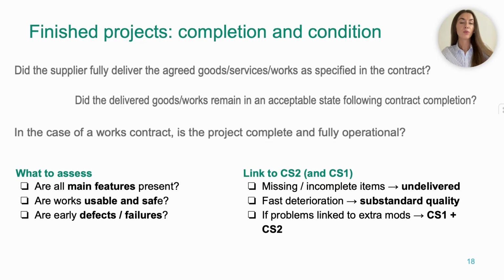Thirdly, you need to ask whether the project is fully operational. Is the street open and safely usable for citizens? Is the renovated school building actually in use? And does the drainage canal properly carry water away during rain? When your answer is no, describe a few concrete examples. For instance, 2 of 4 planned bus shelters missing at time of visit, foundations only.